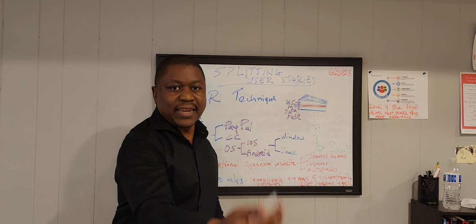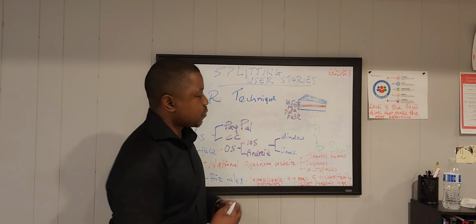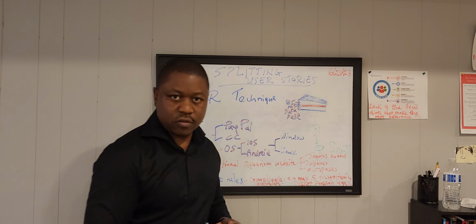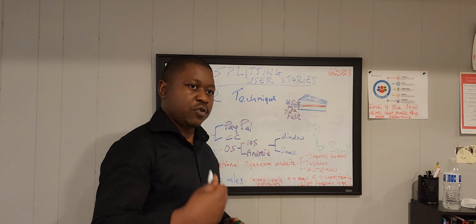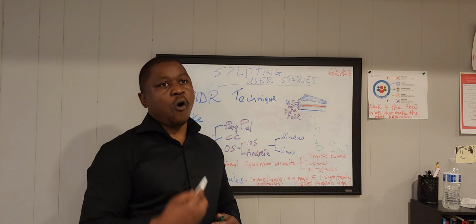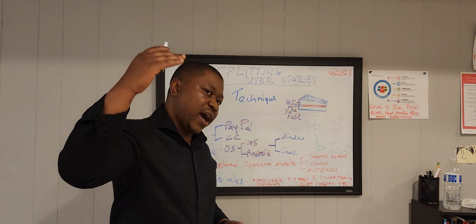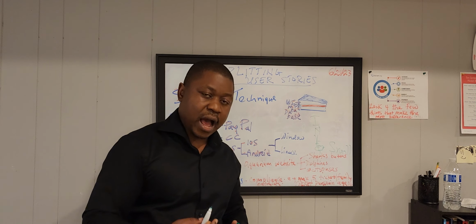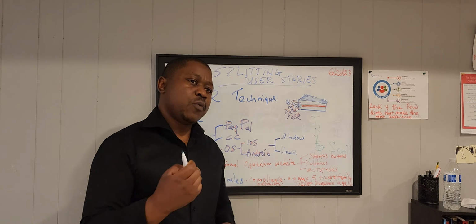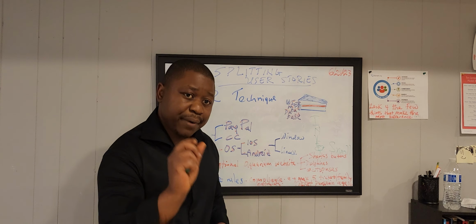Completed within like a day, and that's what I always try to get my teams to size user stories to, to be completed within a day or a maximum of 3 days. So a user story should be like 1 story point or maybe a 3 story pointer maximum. If it starts getting to 5 story points and 8 story points, then we should be having conversations on how we can split them. So why do we want to have user stories or requirements in those bite sizes?